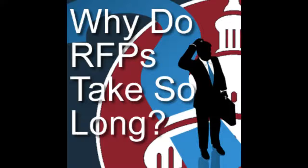You started with a simple requirement of testing vehicles, and now because the contract is worth $50 million, you need different offices to look at it, depending on your agency. I mean, let's say we'll pick on the Air Force. They may have 5 or 6 different people. I did a $3 million modification once that 6 other people had to look at in one particular agency, right?